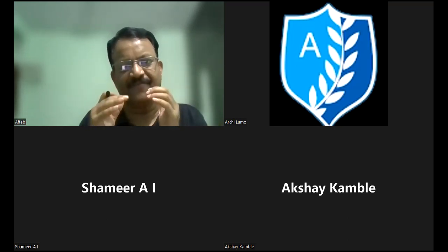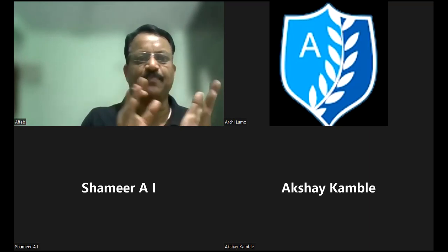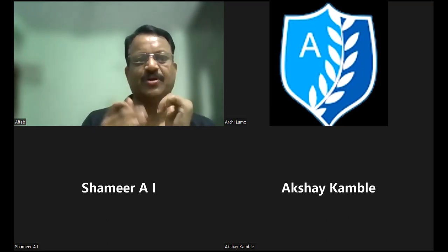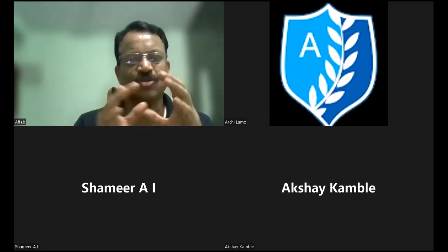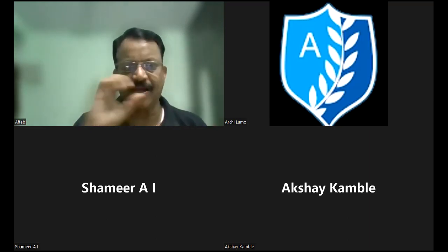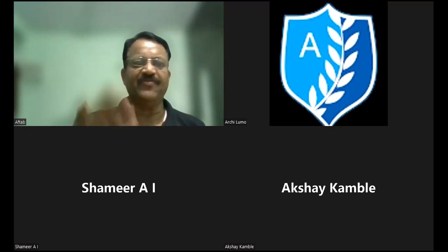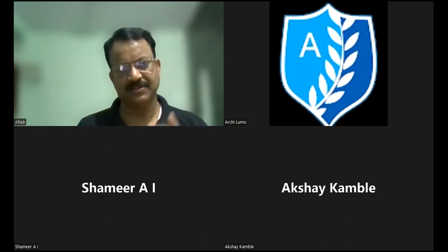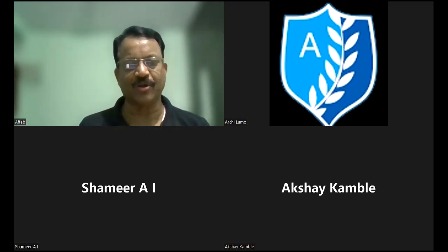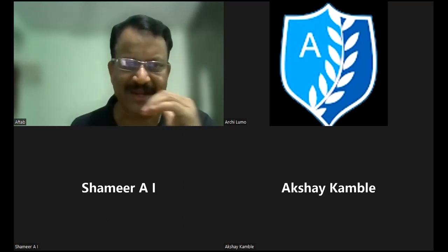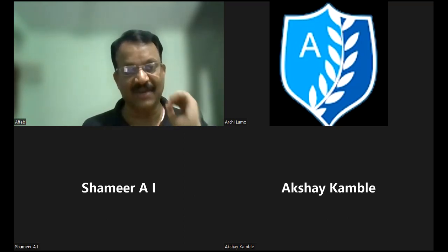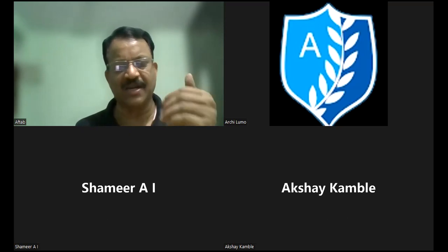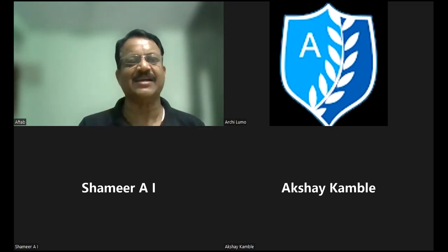All these things we have to monitor. Why? Because to see whether the project is on time or not, on schedule or not, within cost or not, and that any risk is not going to happen. So lots of things have to be monitored regularly at regular intervals, maybe weekly, maybe fortnightly, maybe monthly, depending upon the client's choice or agreement with you or your company. So while you are executing the project, simultaneously, after 1 week or 15 days, whatever is the agreement between you and your client, you have to monitor and control the project.